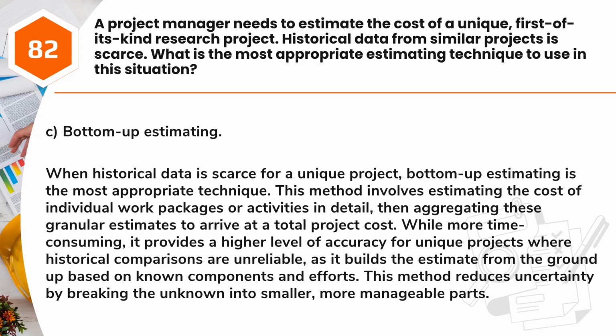While more time-consuming, it provides a higher level of accuracy for unique projects where historical comparisons are unreliable, as it builds the estimate from the ground up based on known components and efforts. This method reduces uncertainty by breaking the unknown into smaller, more manageable parts.